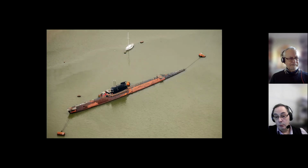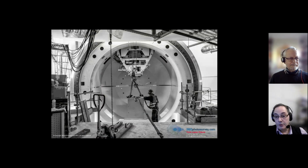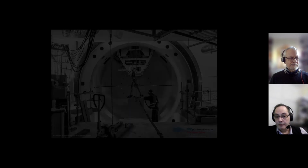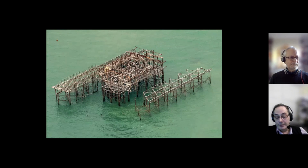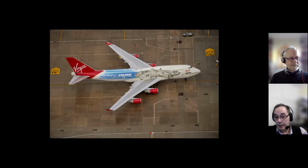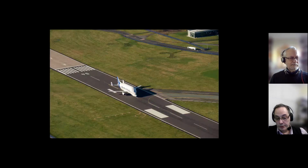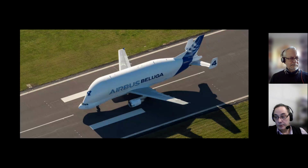If it's progress photography, you want to pick up certain elements of the work. So prior to flying each month, we'll check, is there anything specific that's happened that you want us to capture? And we'll always have that communication throughout the whole of the project. So it's finding out what they're looking for. Is it a client requirement? Highways England, or National Highways as they're called now, have quite specific requirements for their motorway projects. We're always instructed by the main contractor to undertake the operations, so it's ensuring that it's not only for the main contractor's requirements, but to comply with their end clients' needs.